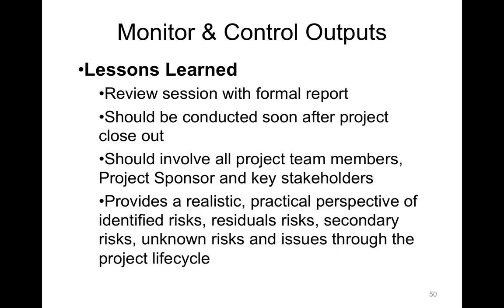Now let's look at lessons learned. Lessons learned is not the same thing as an audit, because the lessons learned is conducted by the actual project management team or the project manager. It's not conducted externally from the project like an audit. It's usually a review session with a formal report as a deliverable. It needs to be conducted soon after the project is closed out. So during the closing process group, this is where you would conduct that. But it is included in monitoring, controlling outputs.